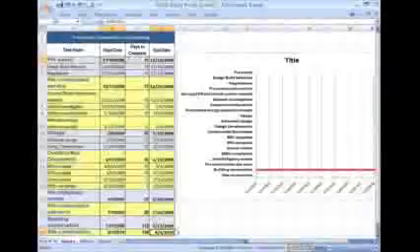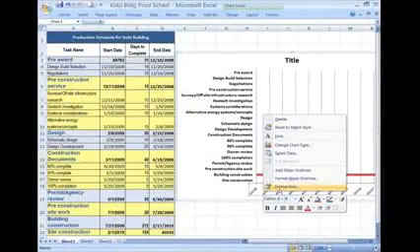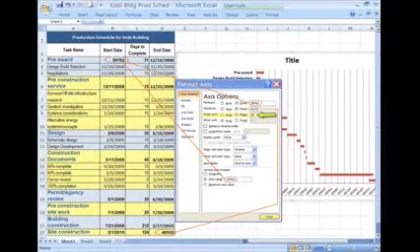We'll begin by changing the earliest date and the latest date to the general format. Next, right-click on the numbers along the bottom to select the X-axis and open the Format menu. Click Format Axis. Under Axis Options, for the minimum, enter 39762, which is our earliest date. Next to Maximum, type 40333. Next to Major Unit, enter 25. Under Vertical Axis Crosses, once again, type 39762 and click the Close button.